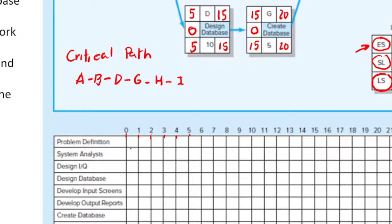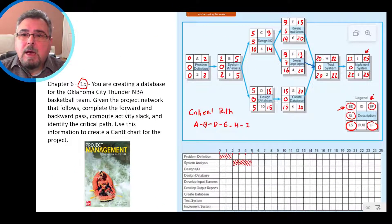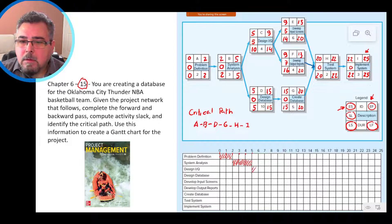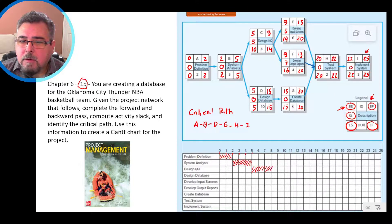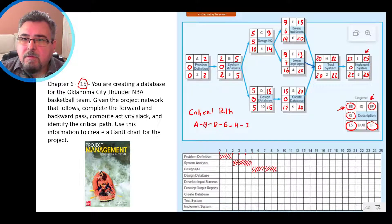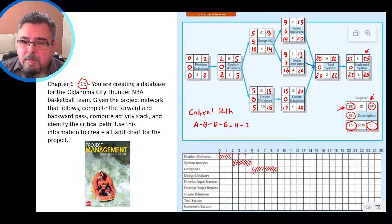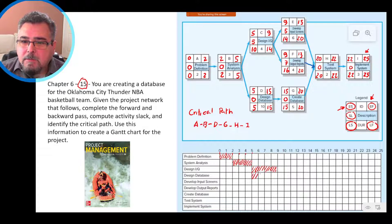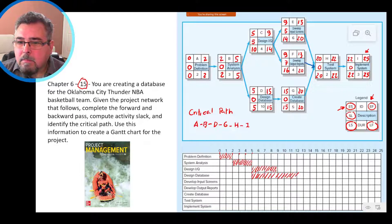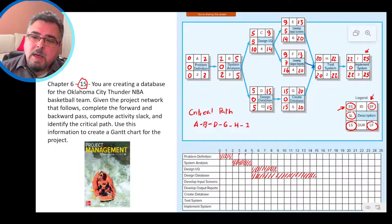You have to put on the top of the line as is shown in the book. And here we say, let's go. Problem definition, start on 0, goes up to 2. Activity B, systems analysis, start on 2, go up to 5. Activity C, design IQ, start on 5, goes up to 9. Activity D, start on 5, design database, 5 until 15.